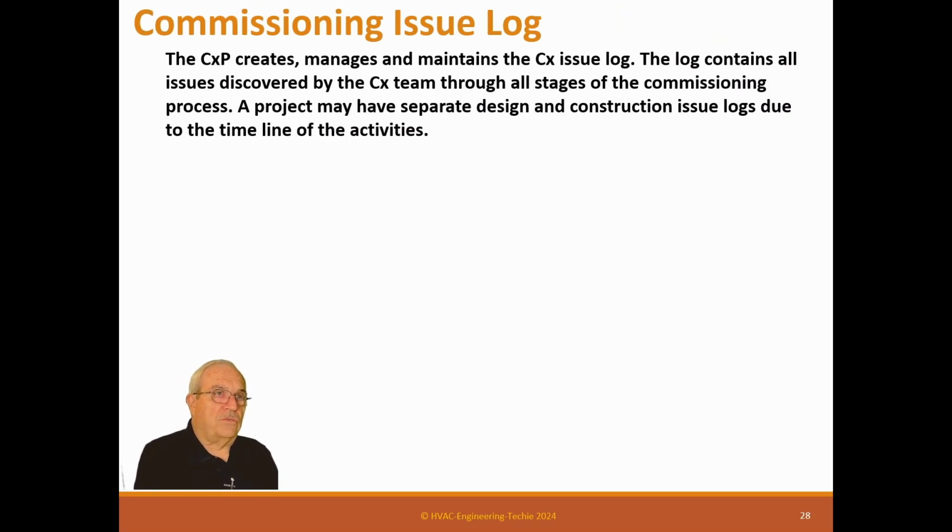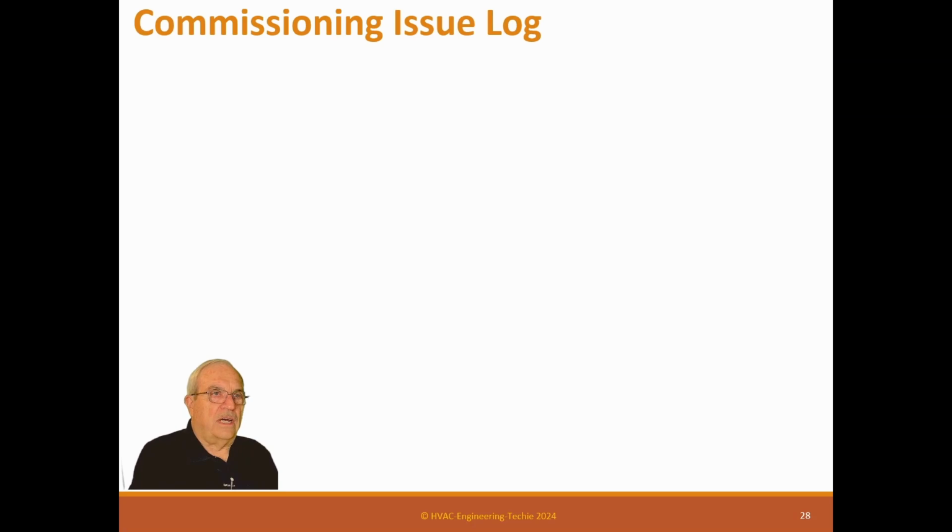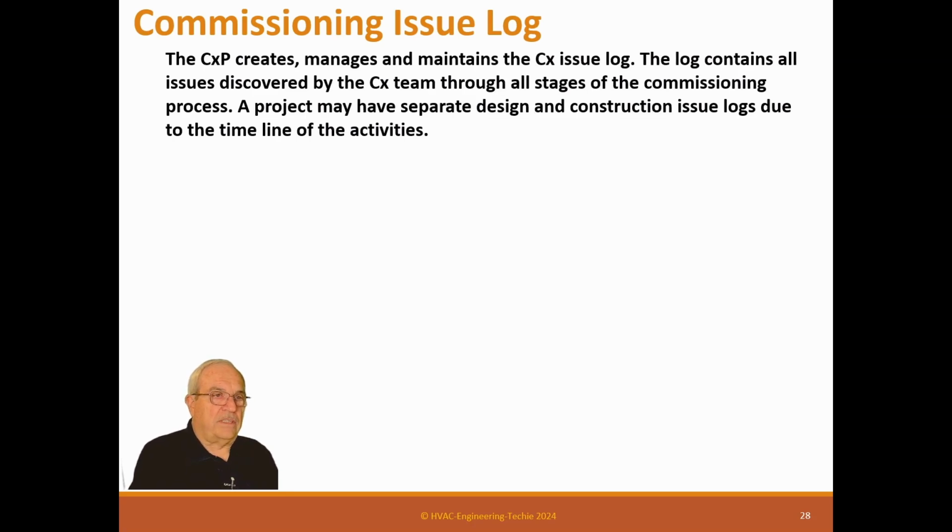The commissioning issue log. The CXP creates, manages, and maintains a CX issue log. The log contains all issues discovered by the CX team through all stages of the commissioning process. A project may have separate design and construction issue logs due to the timeline of the activities.